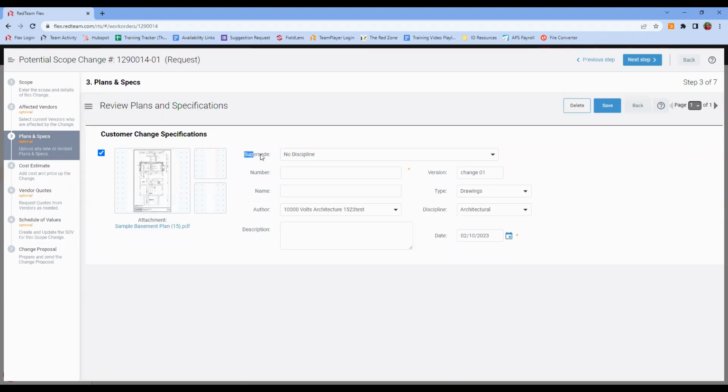There's what I really wanted you to see, right? You're familiar with how to scan your documents, how to put in the name and number, but this supersede field that we normally only see in the addendums, we see it here in the change order, so that if we need to supersede a previous drawing, we'll see all of our plans and specs in this dropdown. We can search for them by name. We don't have to scroll through an enormous list.